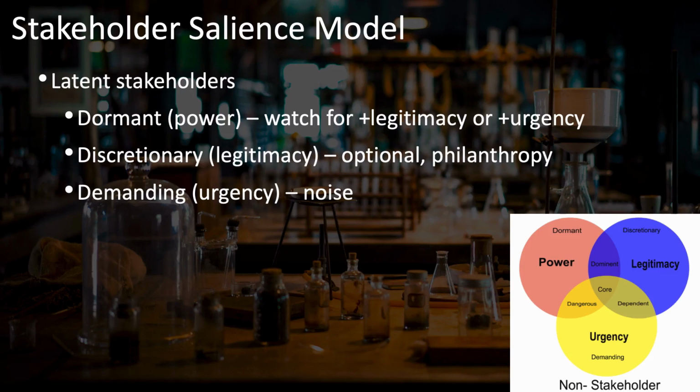Similarly, this could also include disgruntled former employees. They no longer have legitimacy or urgency in the decisions about your project, but they could have some power in that they could bring lawsuits against you, or they could go to the news media and bring public pressure against your project, or could even become violent. So it's important to watch for these dormant stakeholders.